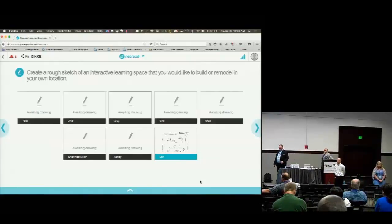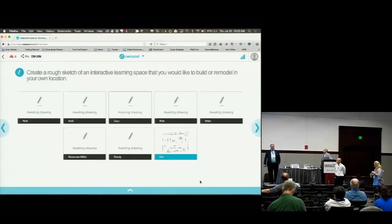Can you talk a little bit about the purchasing process? What did you do? Did you have a design that went out for a bid? Yes. Or was this a design build? I wish it had been design build more so. We did get lucky. We came dangerously close to a bad bid winning, but it turned out they made a math error. Somebody only bid on one table, not 30 tables, and when we did the math, their number was not as good.